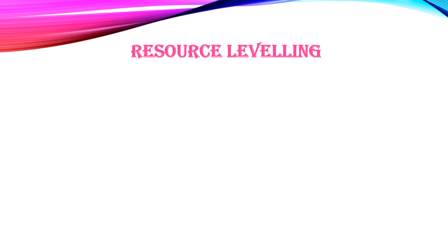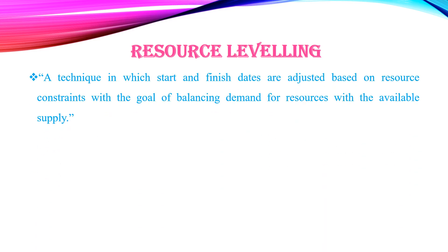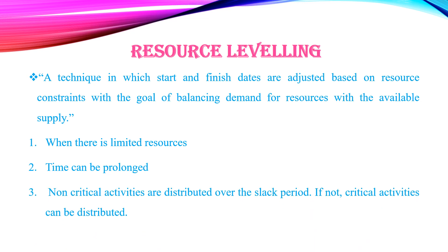Resource leveling is used when a project is resource-constrained — the level of resource availability cannot be exceeded. The start and end of activities are adjusted to confirm resource availability. Resource leveling adjusts start and finish dates based on resource constraints with the goal of balancing demand for resources with available supply. It is used when resources are limited and time can be prolonged; non-critical activities are distributed over the slack period.